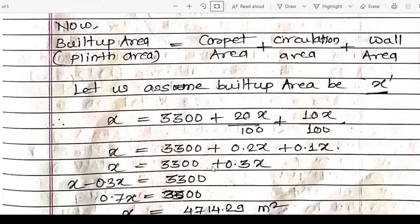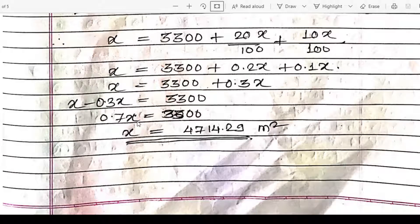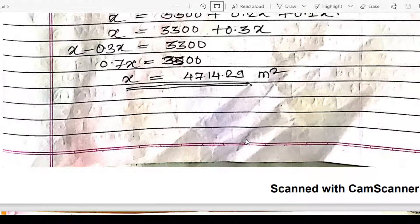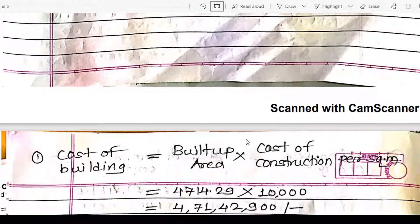Then x = 3,300 + 0.3x. Moving 0.3x to the left side: x minus 0.3x = 3,300, so 0.7x = 3,300, giving x = 4,714.29 square meters. This is the built-up area of the building, which is also the plinth area.